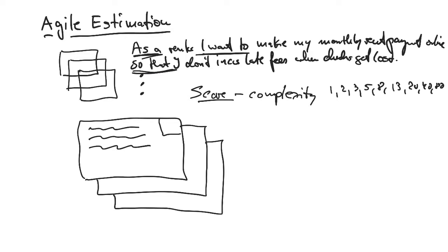You end up with a somewhat normal distribution, which means most things cluster around the mean. So it's very hard to know what the true complexity of a story is and to know which ones are simple, which ones are medium hard, and which ones are really hard. So the modified Fibonacci scale kind of forces that drawing away of the outliers from the mean.